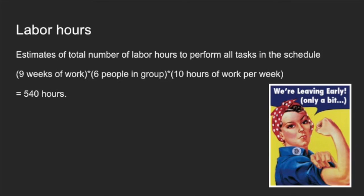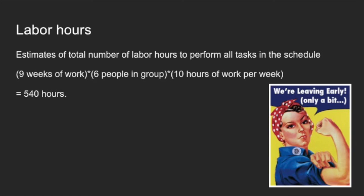In comparison to the estimation from our requirements analysis phase, the amount of hours has decreased as the availability risk has resulted in lack of co-working together and redoing work as a result of not enough discussion in the group and understanding of the questions. Because we also added a few tasks into the schedule, such as testing, the labor hours needed to be higher than 378 hours in total, which was the estimation for our last phase.